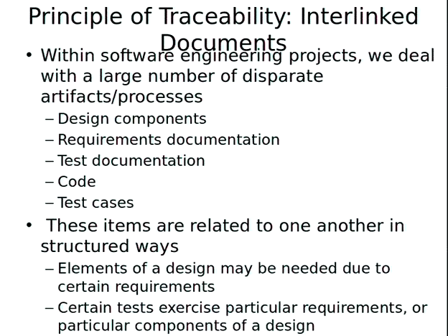Everything that results from it. Yeah. So it could impact the design of the system in terms of the architecture and how the different modules will work together, the APIs in place for each module, the interfaces they expose. All those things could be affected, and so could the code, right? A change in requirements ripples through to changes to lots and lots of components. A change in design can impact downstream things like code, and both of those types of things can impact test